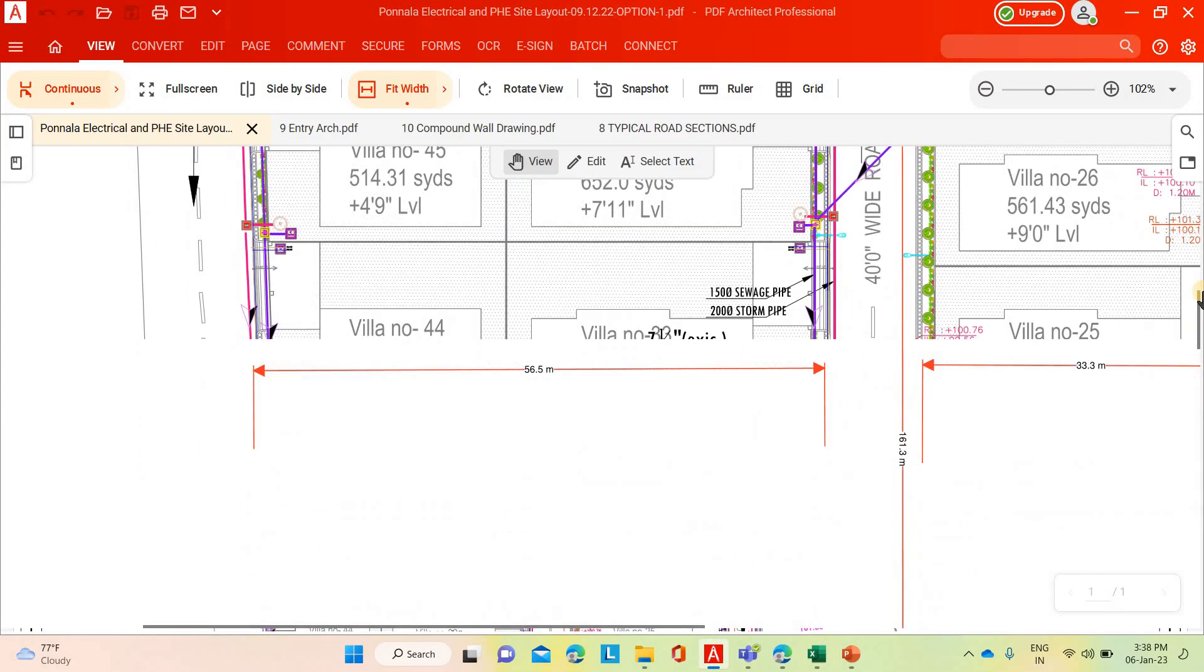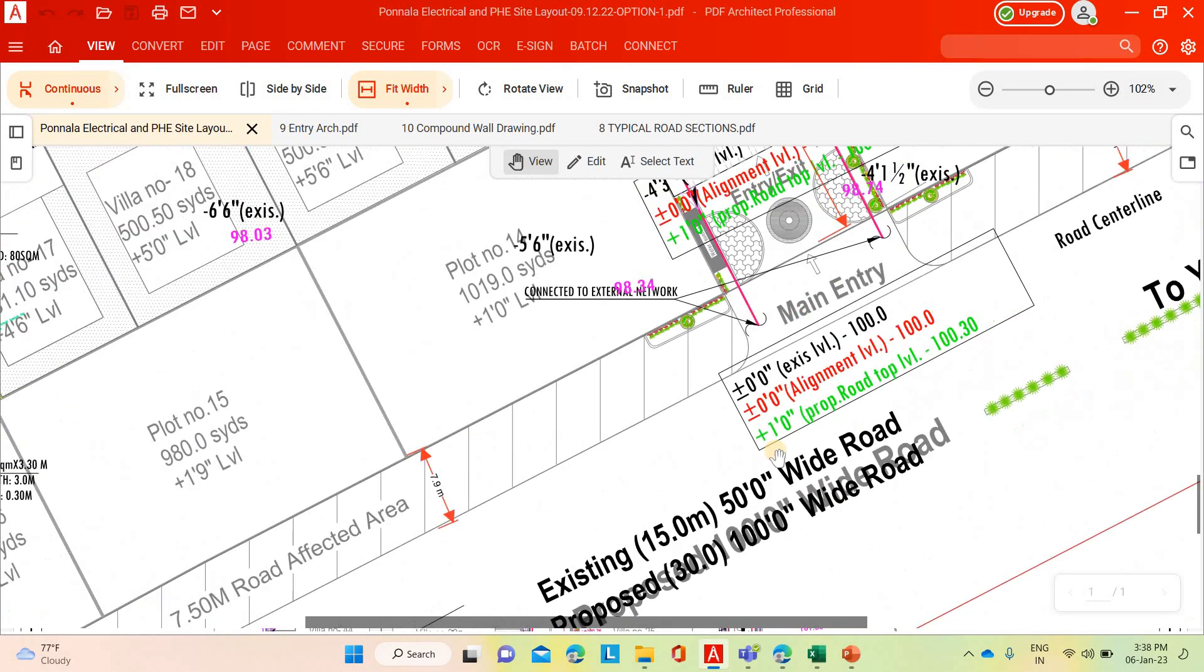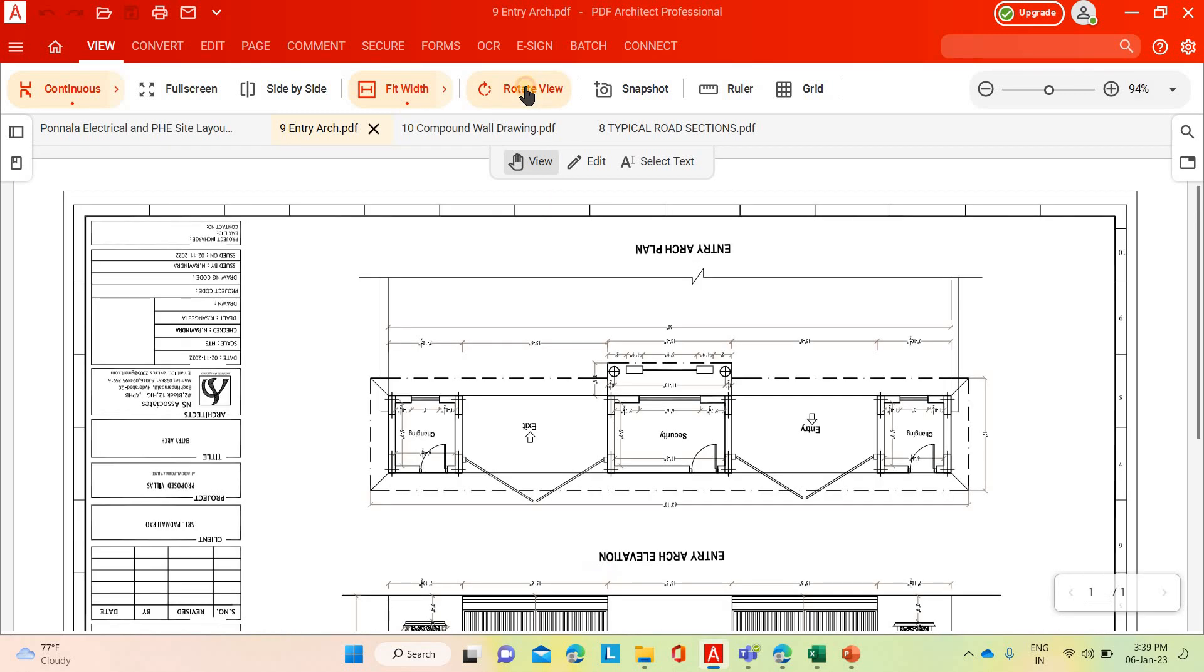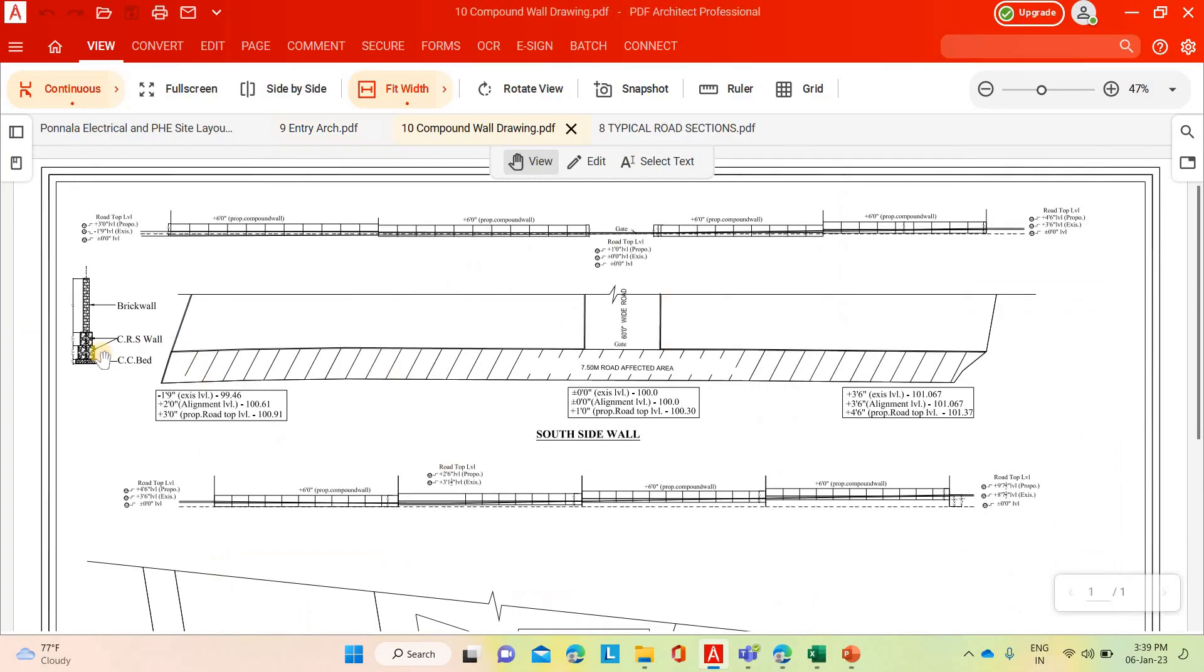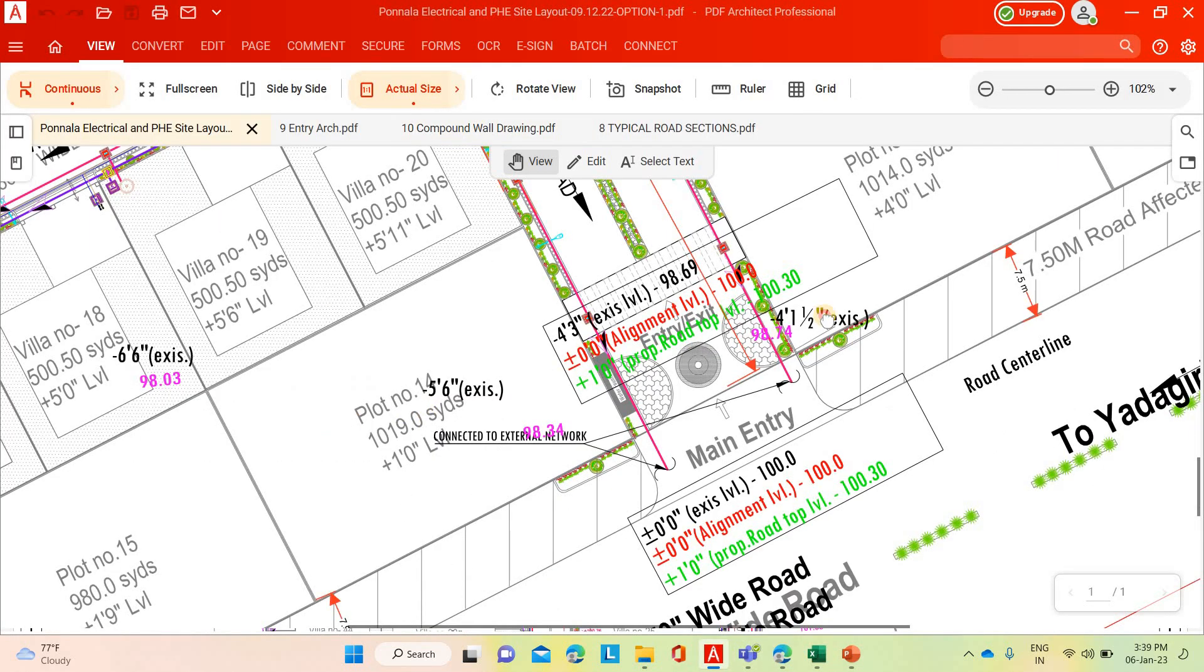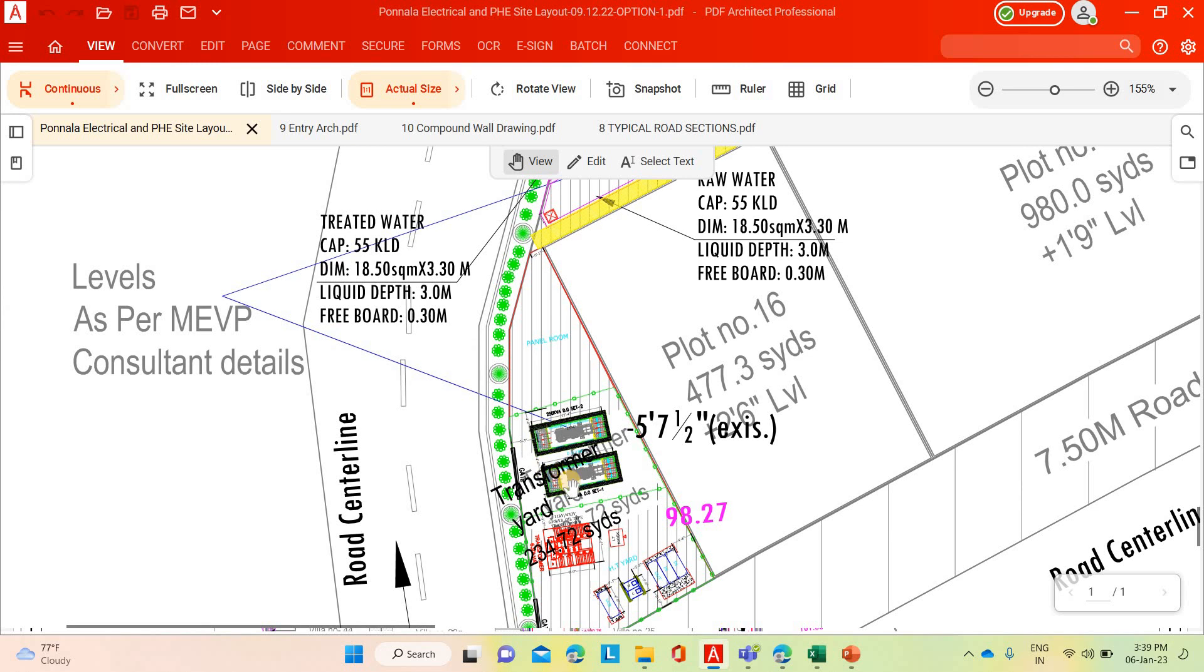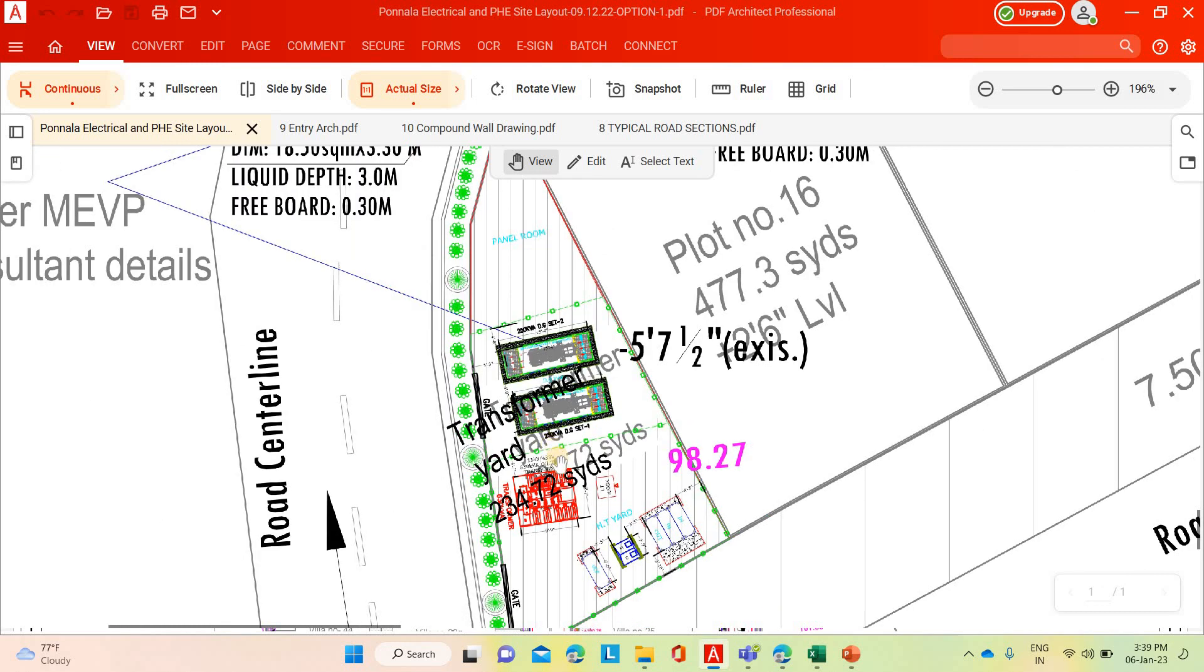If you see here our layout, main entrance arch. This is the entrance arch. Then compound wall. Compound wall is as given by the architect. You see the compound wall, typical compound wall cross section. Below ground level is the CRS masonry, above also one foot six inches CRS masonry. Then six feet height brick wall. Then transformer area civil works. Transformer area is clearly mentioned in the layout. 200-250 kVA DG set, transformers, transformer foundations, control panel foundations, switchgear panels. For that foundations, we need to estimate the civil works.